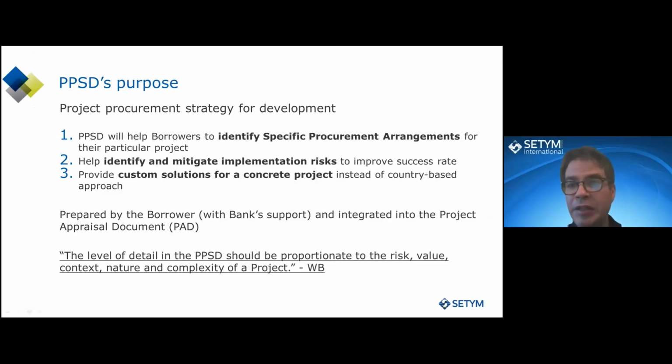So what is the PPSD purpose? Well, there's a couple things. PPSD's purpose is to help borrowers identify specific procurement arrangements. Procurement arrangements in the reform are basically different approaches, different techniques. It's also to help them identify and mitigate implementation risks, so risks related to procurement during project implementation, so as to improve the success rate. It is also there to provide custom solutions for a concrete project instead of a country-based approach.